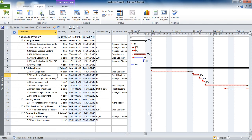Now, a constraint is used to restrict the start and finish date of a task. It's recommended to only use a constraint when it's something that's out of your control. Common examples will be a delivery of supplies for your task or the availability of a venue. Generally it's something you can't control, it's an external factor, but it will determine the start or finish date of your task.